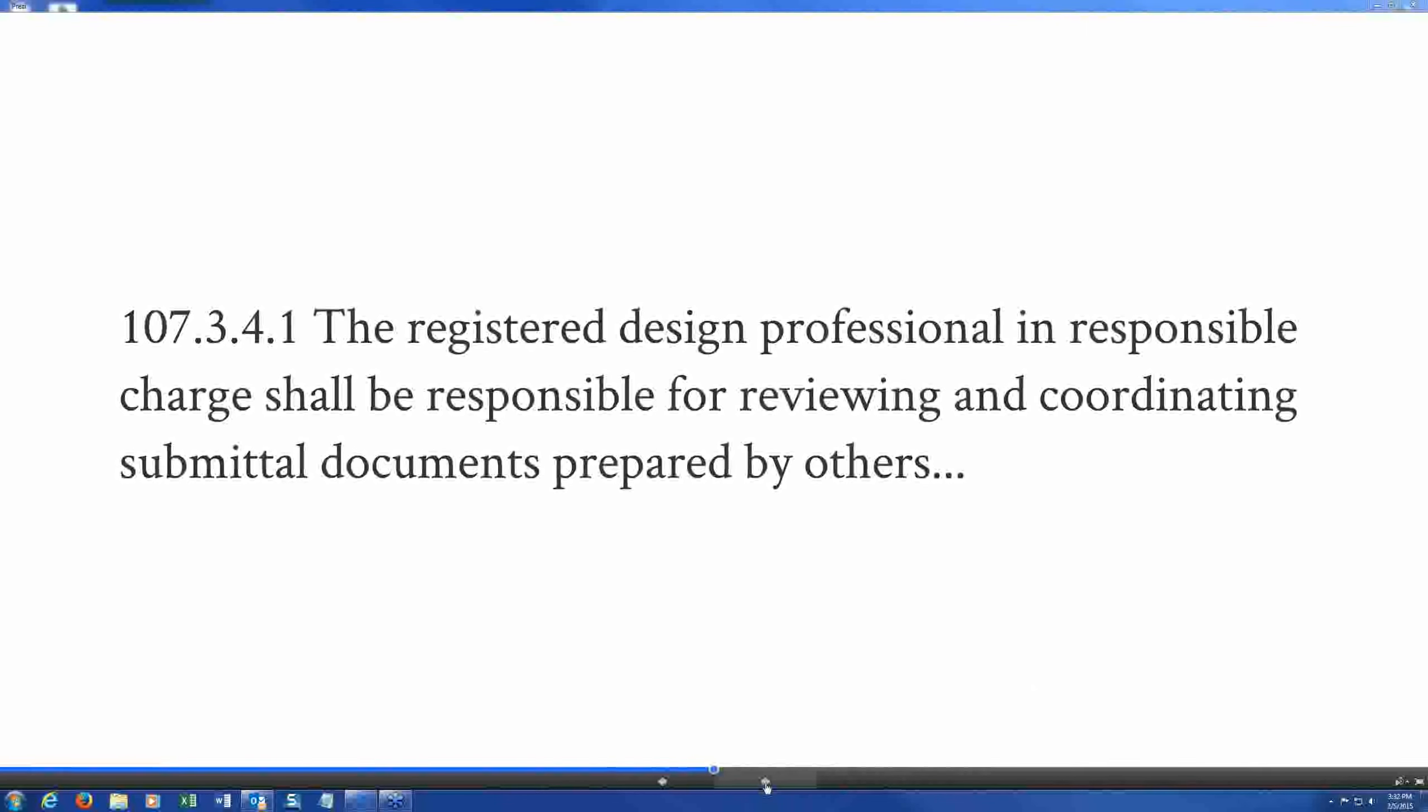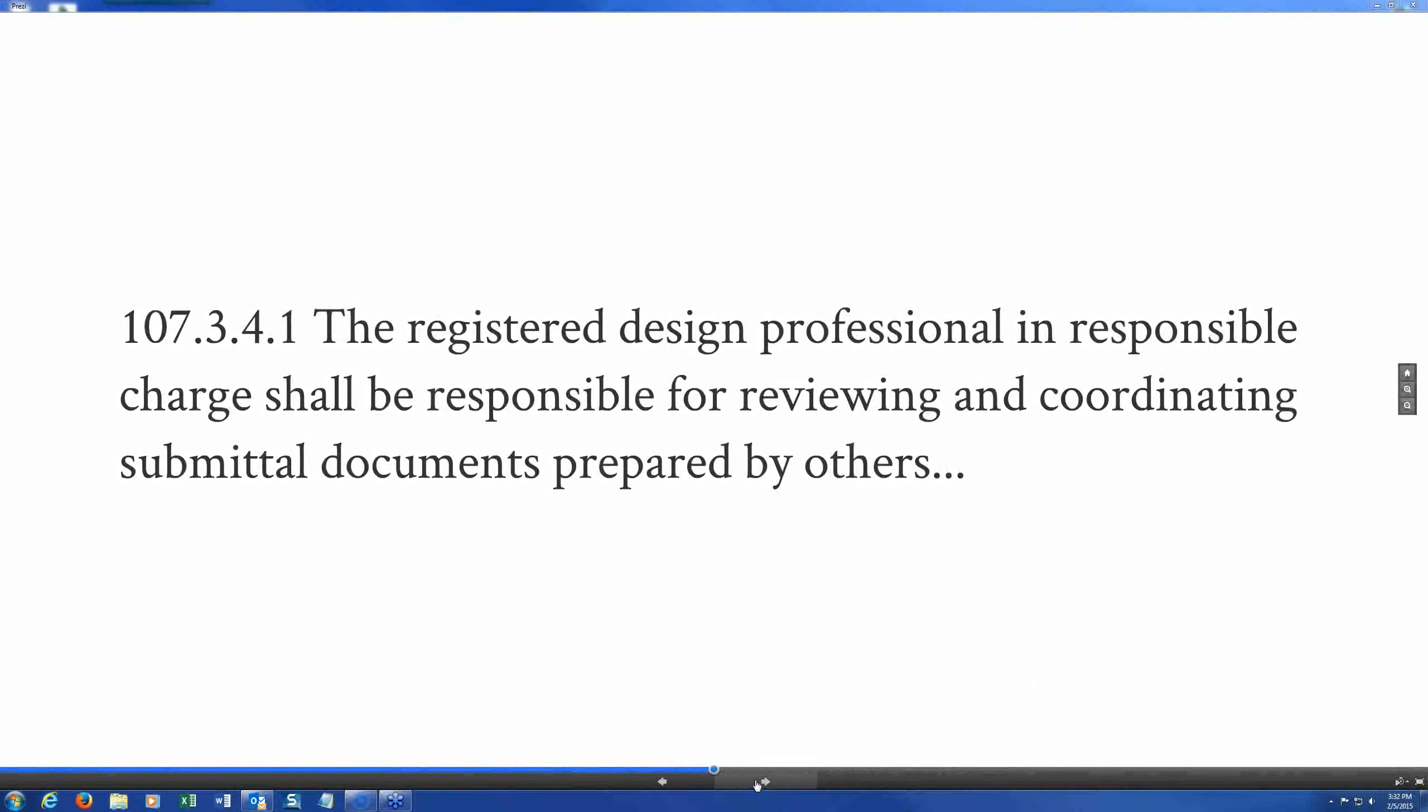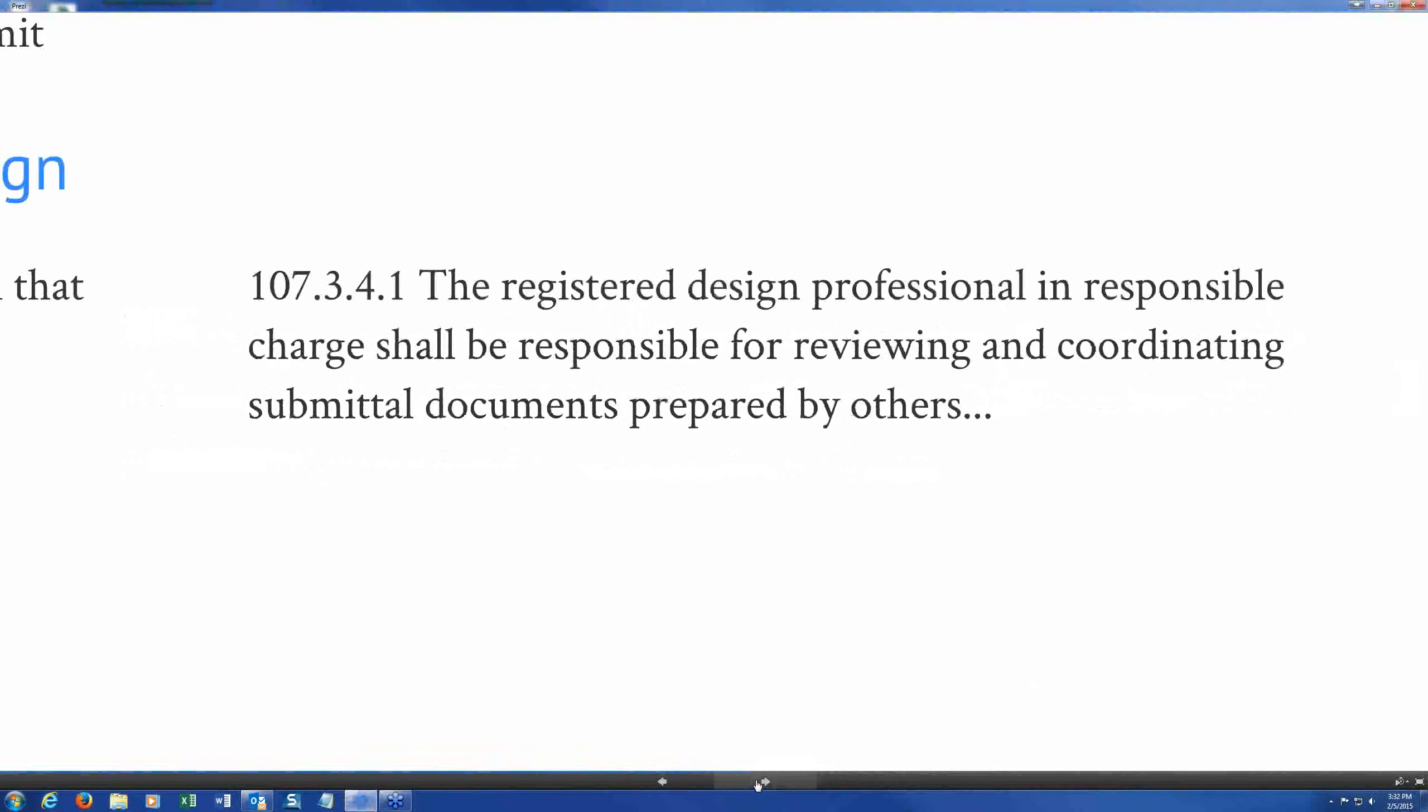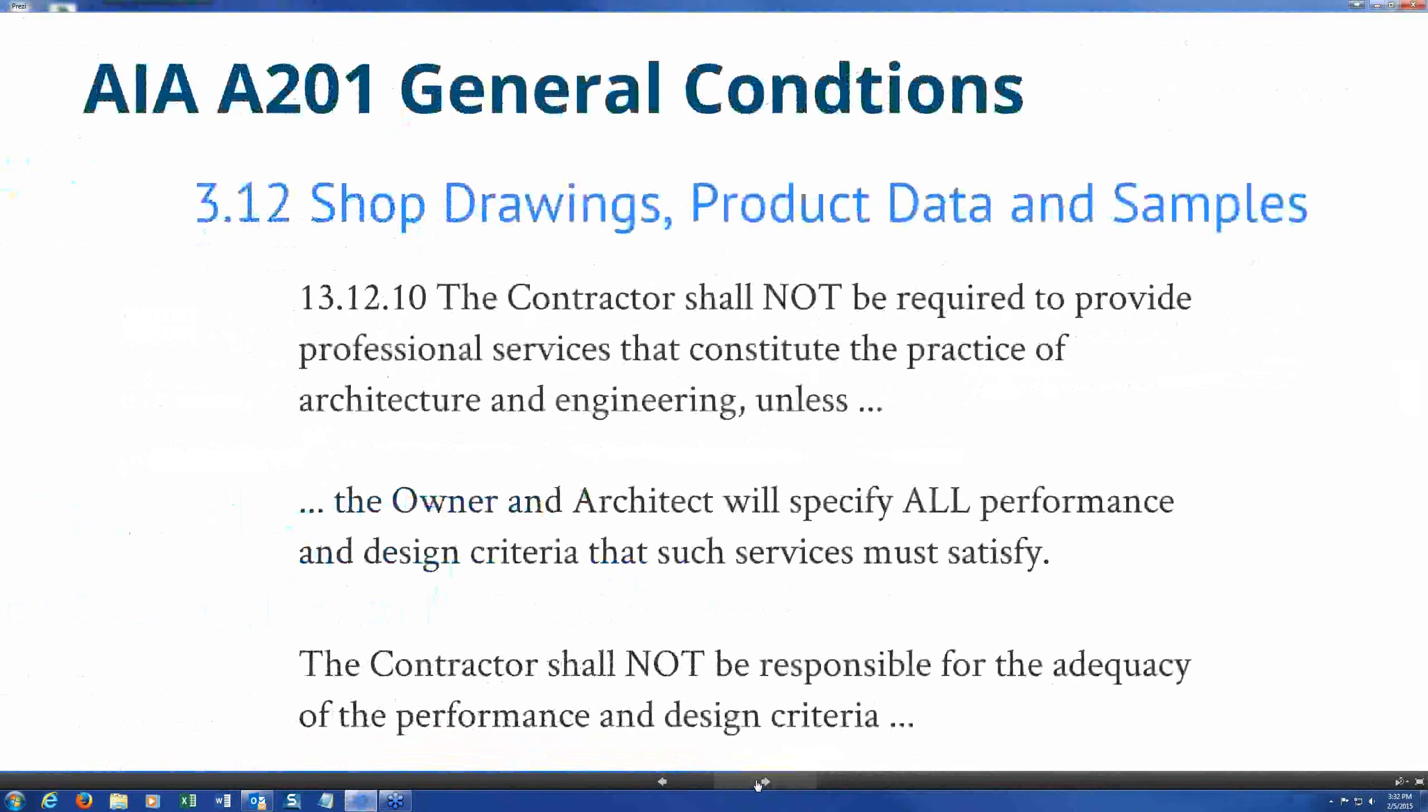For fast-track construction we're not going to issue all the documents at once. And so we may issue first the foundations, and then one of the deferred submittals is going to be the envelope package, and then another deferred submittal would be the core and the architectural interiors and so on. And there may be quite a few of those work packages that are deferred submittals that are contract documents. Lewis I'd like to try to put somebody else here on the spot. Robin Snyder, I see you were on the call, and I threatened by a phone call message that if you were available perhaps you would want to join us. So if you're able to do the audio you want to raise your hand. Robin's not taking us up on that.